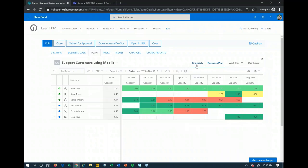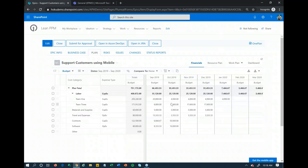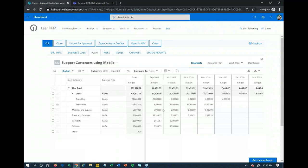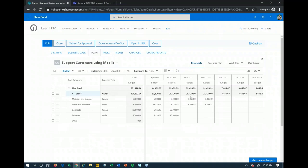Once you have your resource plan together, you can go ahead and build out your budget. The very first step is to get your labor costs. To do that, I can simply hit Import and import from that resource plan I just created — it will then calculate out all of my labor costs based off of that resource plan and blended rates set up beforehand. So I don't have to do that calculation outside the system in an Excel spreadsheet. From there, I can key in any other cost categories needed — things like materials and supplies, travel and expenses, contracts, software, other. This is all configurable to match your cost categories.